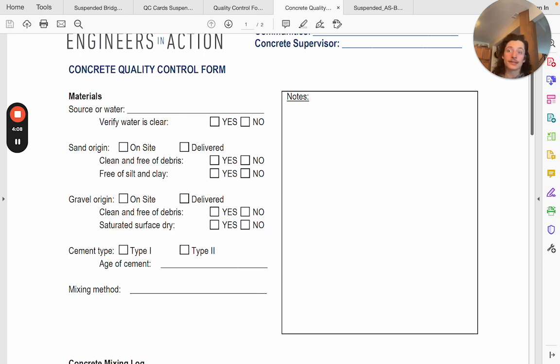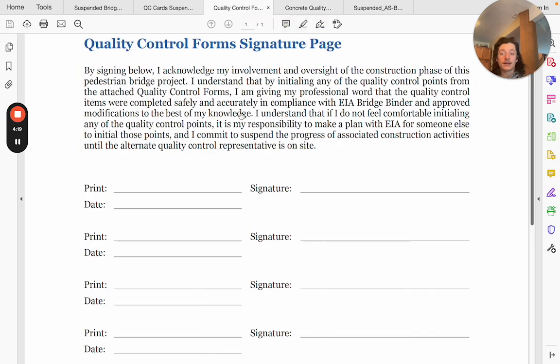Not only can you help the construction manager to not forget these items, but you are an integral part of the process. What potential roadblocks are you facing? If one of these roadblocks is not getting a signature on the QC form, this is not something we can wait to hear at Review Call 4. The entire team needs to know this right away so we can start taking remedial action, whether it's because the FEIC doesn't feel comfortable signing or because something wasn't built correctly. It doesn't matter, but we need to be working towards fixing that and getting the bridge done.